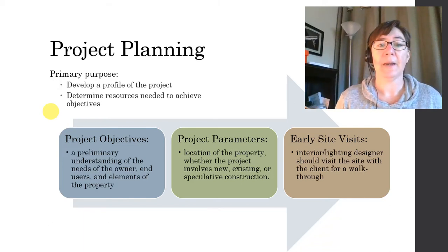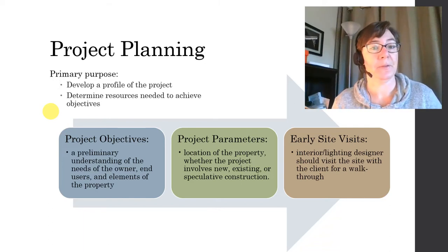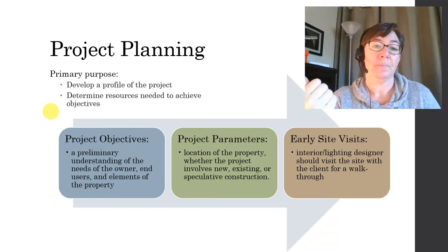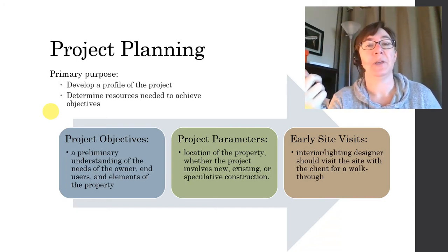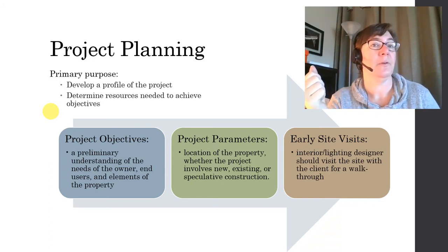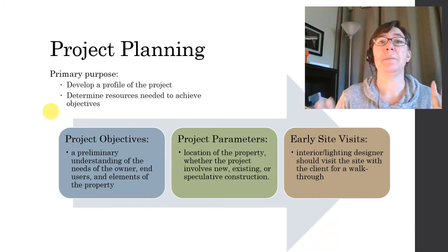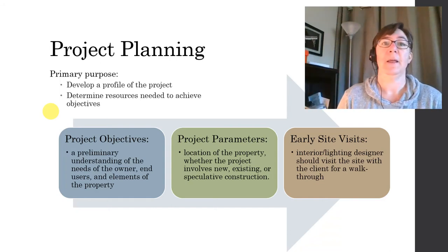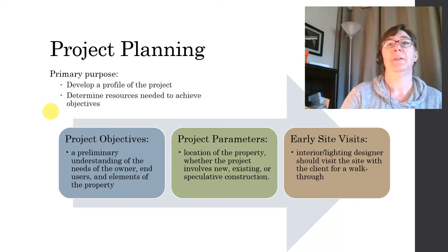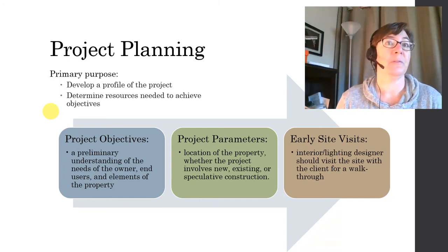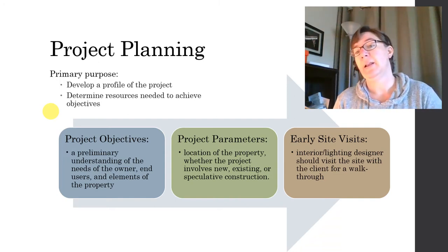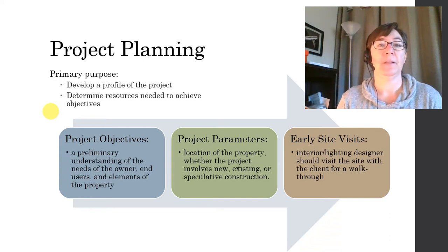That includes some of the project parameters, the property location, whether your project involves new or existing construction, and whether it's speculative or not. These are some really basic project parameters. And we're talking in this phase before you even sign the contract or before you even prepare a contract for this project. Finally, project planning also includes some early site visits, and the designer should do a preliminary walkthrough with the client.